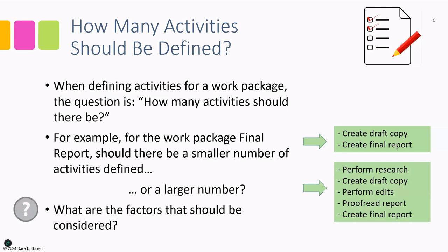Certainly the complexity of the work package, how intricate the work is. If it's highly complex, that would lead you to define more activities. If it was fairly simple, fewer. The duration of time that the work package will likely take to complete. If it's a short period, it's probably fewer activities. If it's a longer period, probably more activities.